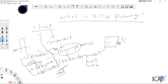This piece of paper that gives information about the items the contractor must deal with, along with their quantities, is known as the Bill of Quantity. The quantities are obtained using the drawings. The consultant has specialized persons called quantity estimators who are very proficient in measuring from drawings. The contractor fills in the rate and calculates the total amount.